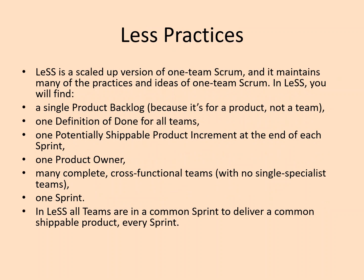LeSS is a scaled-up version of one-team Scrum and it maintains many of the practices and ideas of one-team Scrum. There is a single product backlog because it is for a product, not a team, and one definition of done for all teams so they don't deviate. Every team focuses on one definition of done, and there is one potentially shippable product increment at the end of each sprint, and one product owner because there is only one product backlog.